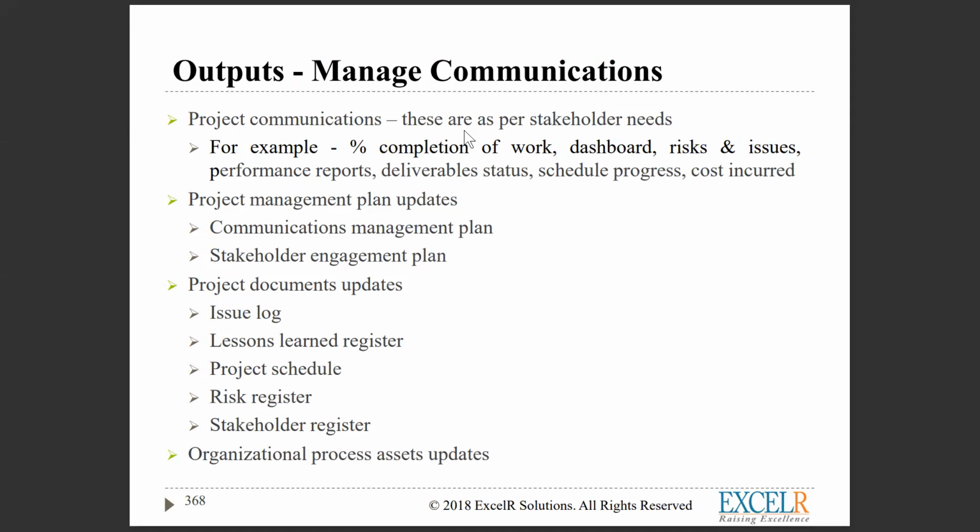Dashboards. You need to have a dashboard, an entire dashboard. It will depict the entire picture of your project. Risk and issues, any reports, deliverable status, which module is delivering on what date. That status needs to be available.